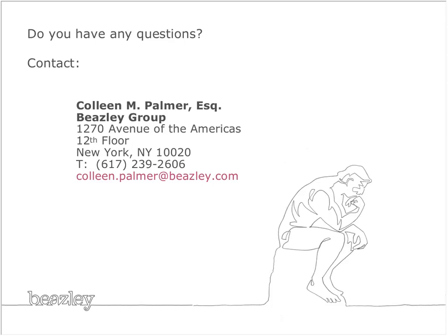Okay. The next question is, can you re-explain, clarify recommendations regarding electronic documents? Yep. So electronic documents, the issue with them is that because they're electronic, they can be modified unintentionally or otherwise, so you can't tell that they are. So you want to make sure that in your contract, if you are required to provide your electronic documents, you're still getting paid first. You're still limiting the use to the project for which they were prepared.